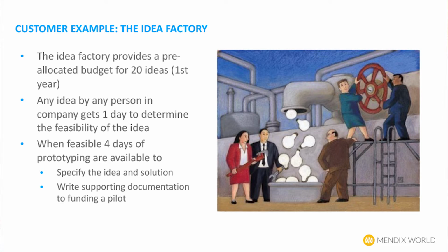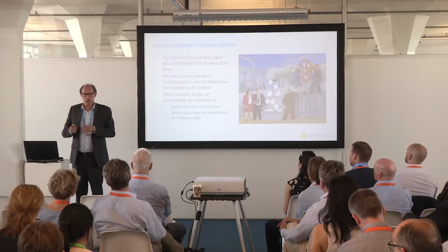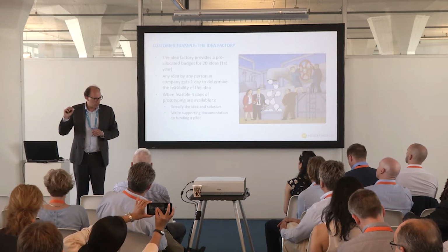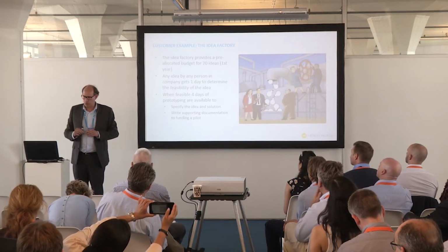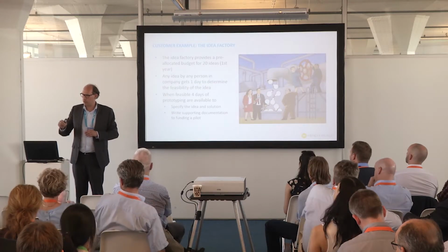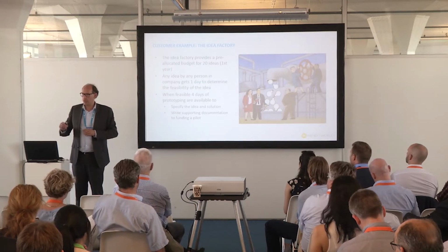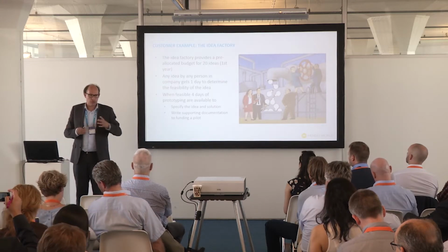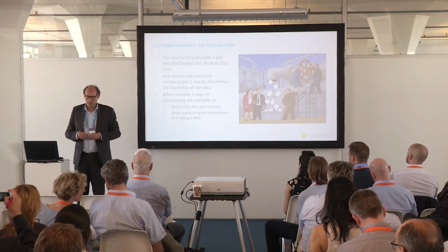What they've done is they've got a pre-allocated budget, and with that pre-allocated budget, they can look at a number of projects every year, and with this they have a fixed approach. So if you've got an idea, that idea needs to be looked at, supported by your manager. If your manager supports it, you get one day with an analyst to look at the idea, write a case, and work it out. If that goes through the approval, you can then go to the next phase.